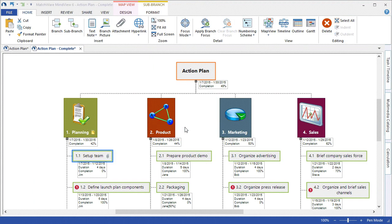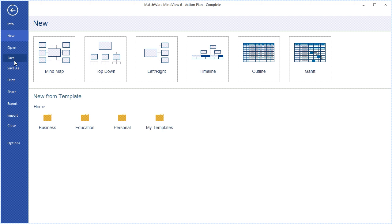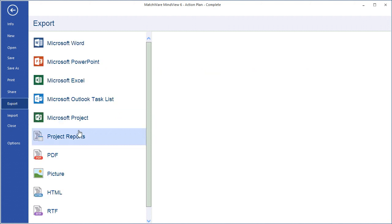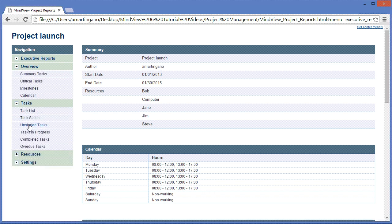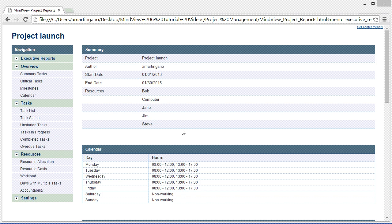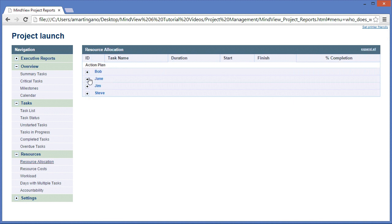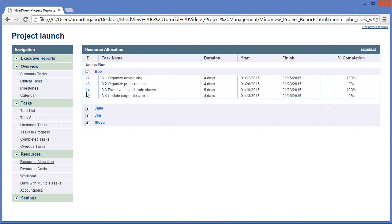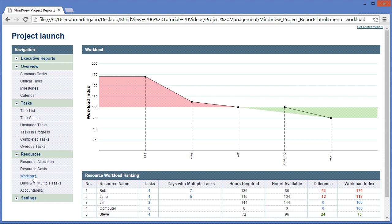The last export we'll review are the MindView project reports. When I choose Export, Project Reports, MindView will convert the MindView document into a self-contained HTML website which can be used as a visual dashboard report for teams and managers. The Project Reports function like a standard website with navigation across the left bar. Users can navigate sections such as the Executive Report, a Task List for the Project, the corresponding Resource Allocation for who is doing what on the individual projects, and even see a Workload or Accountability Report to make sure that you're assigning tasks to resources accurately. It's important to mention that the Project Reports cannot be edited. You'd simply alter the MindView document and rerun the report.